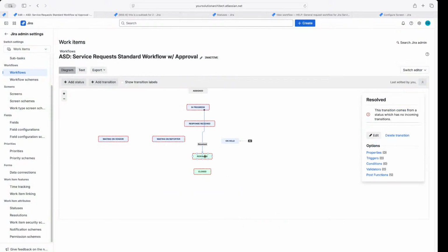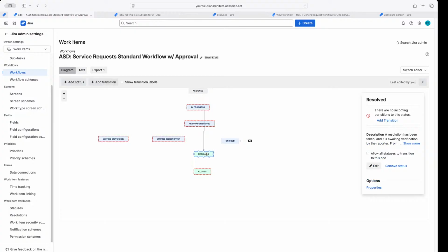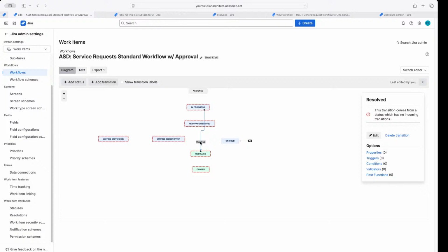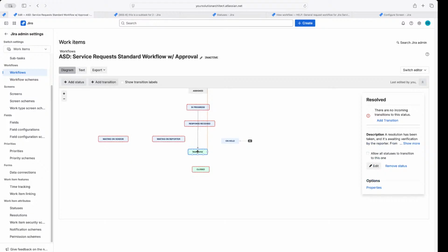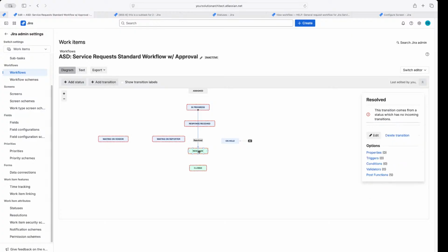Now, because this is a done status, even though the category of the actual status is done, there's a magic little field inside of Jira called the resolution field. And this is why a lot of people's boards are broken. They'll be like, why are done items showing in my queue or on my board? It's because out of the box, it's looking for the resolution field to be empty. I wish they'd change that to status category, but that's just how out of the box it's designed.